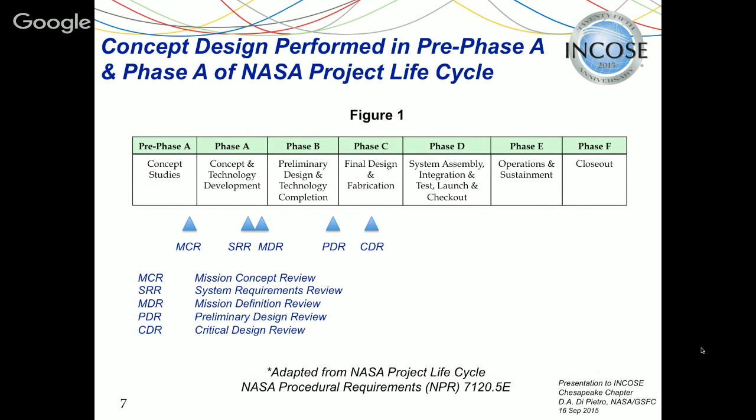And you're putting this together with all the subsystems inputs to narrow the margins. Right. At every phase, you're going to have an accounting of all the mass, and the degree to which you understand that mass and the margin that should be on it is going to improve as you move through the life cycle. And as you get hardware in hand, it's going to get much, much better, provided your design is appropriate. If you've got a good design point, then that makes sense. If your design point is not well matched, or there's some lurking something you missed in phase A, a big thing, then your mass and power estimates can jump on you.